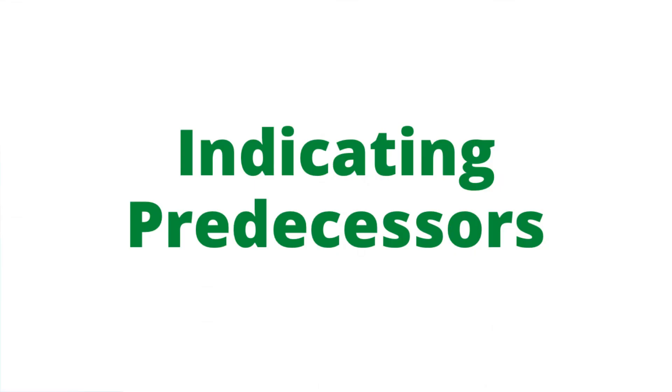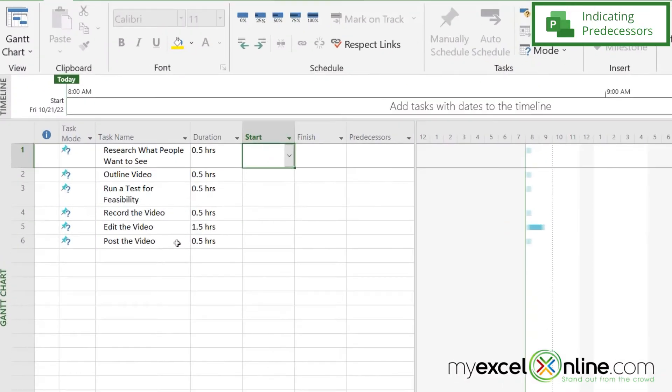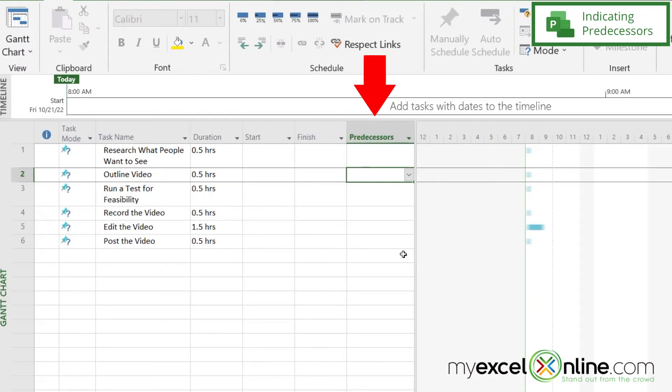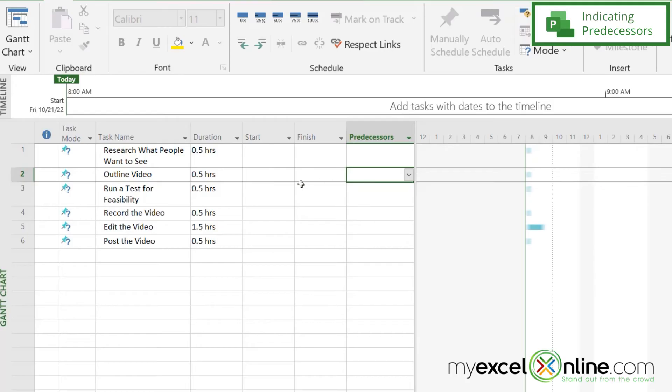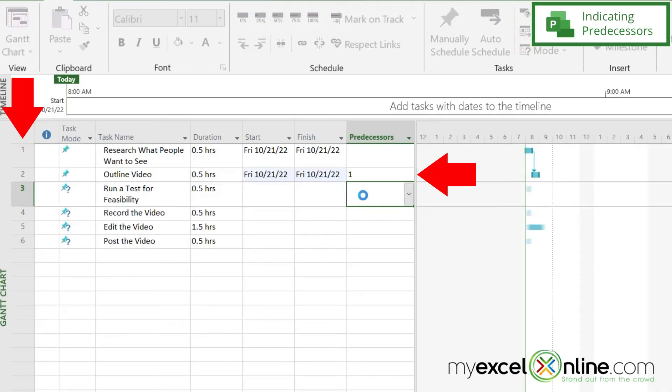But there's an issue here. Every one of these steps needs to happen before the previous step. So that's what these predecessors are right here. Right here, I can't outline my video until I research what I think people might want to see. So if I look up here, this is step one. So my predecessor here needs to be step one. And you can see when I put that in, that it automatically adjusts right here.